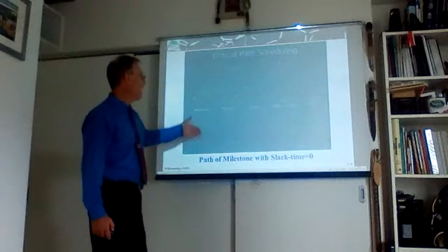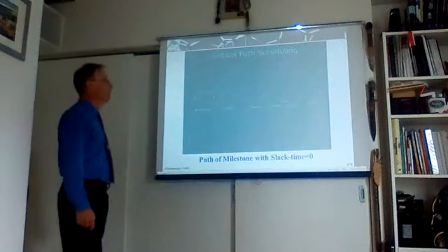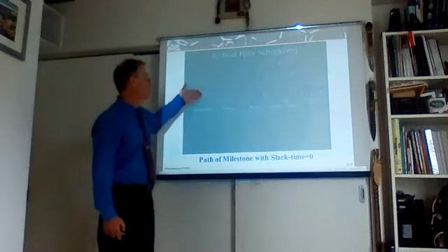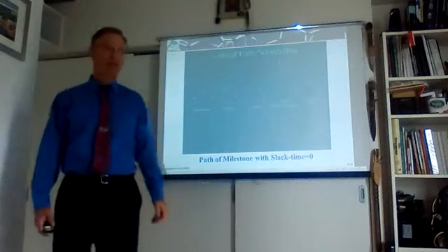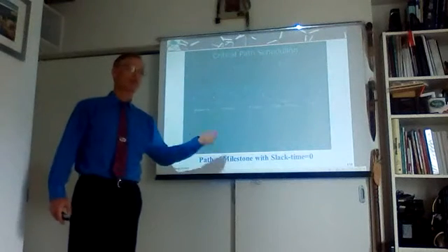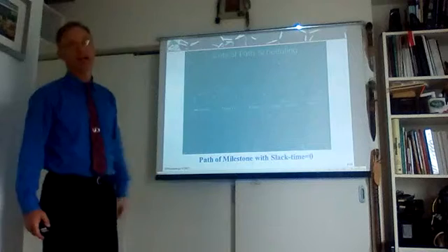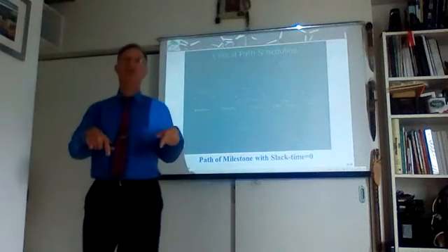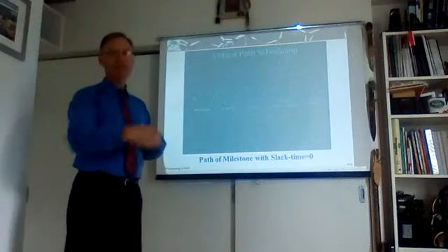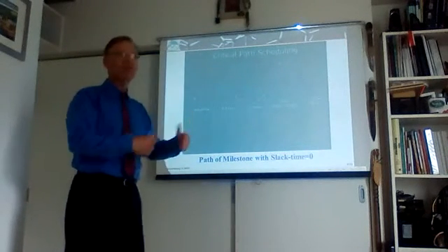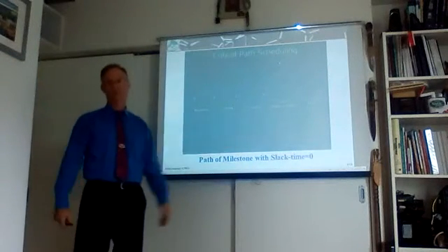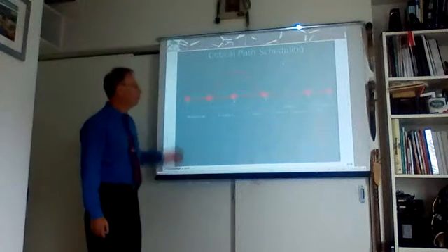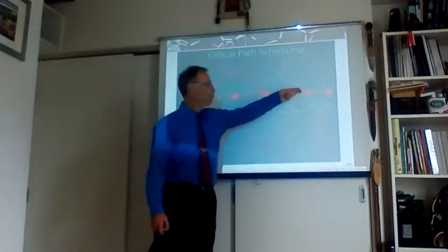Each and every milestone and task will have its timing. When is it starting? How much time will the task take? It might be the optimistic, pessimistic, or the most likely estimation of time. We're supposed to put all that in a table, including what is known as slack time: time that we have in between the tasks that are not interfering with the process. Based on that, we will define what is the critical path.